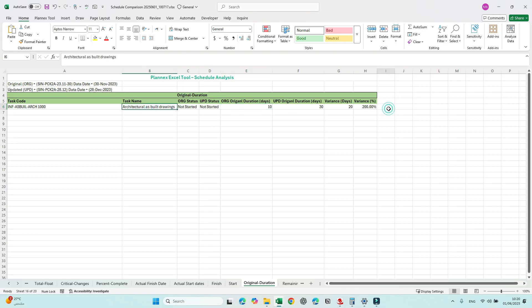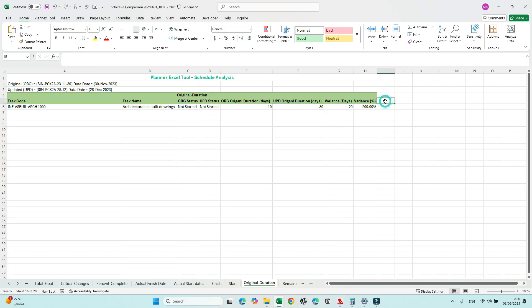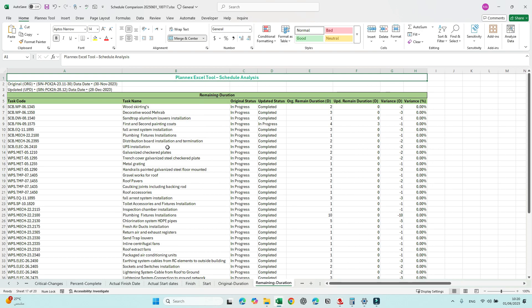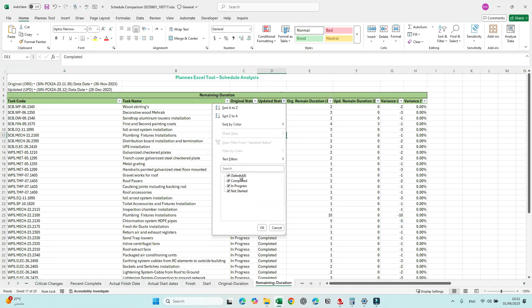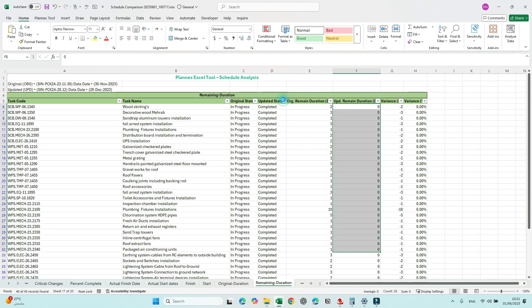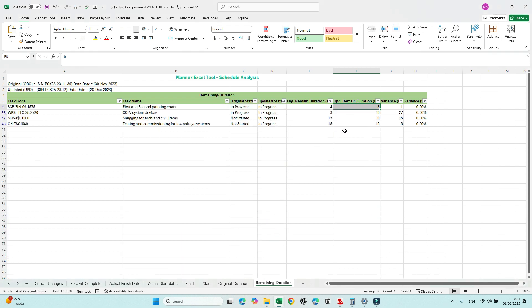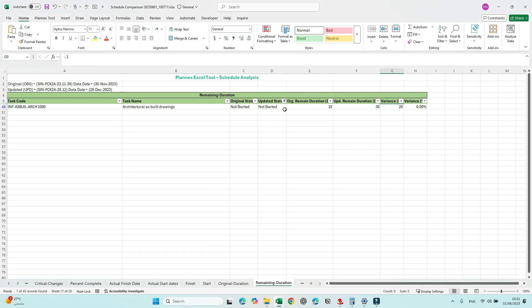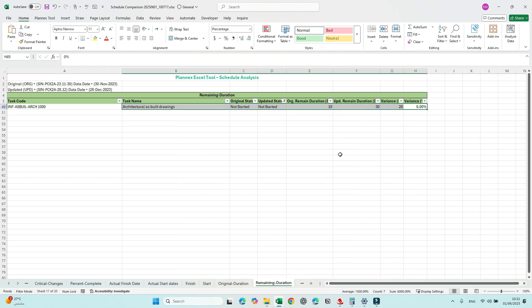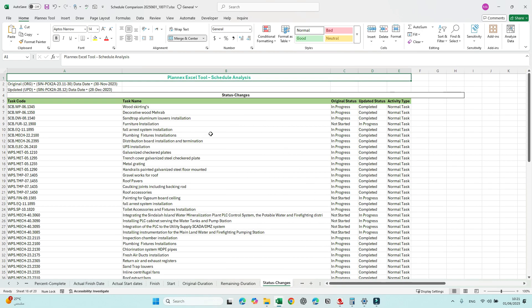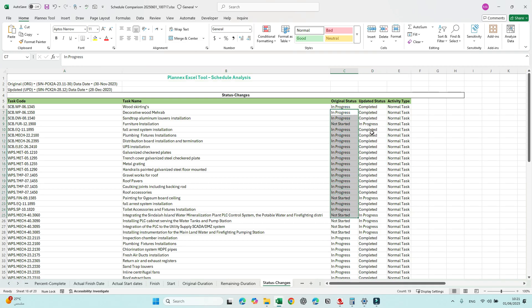Original Duration: we need to justify why for a not-started activity the original duration changed from 10 days to 30 days — this should be captured in the comments. For Remaining Duration, a quick check shows all within 30 days for completed activities — remaining duration is zero, which is fine. For in-progress activities the variance is within 30 days, which is acceptable. But for not-started activities with the same issue as original duration, the variance may need to be adjusted.